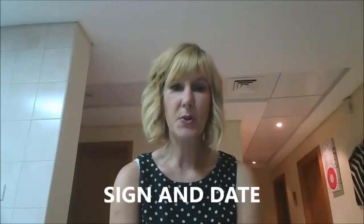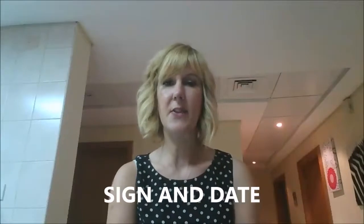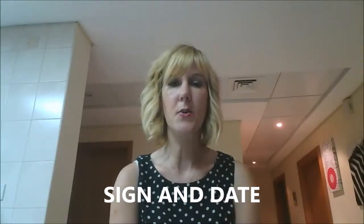And actually this is where a third party company is really beneficial, because they're familiar with the construction terms and they can get the message across to your builder very easily on what needs to be done to close out those items. So when you've finished your list, make sure that you sign it and put the date in. The date's very important so that all parties know that was the date you recorded the snags on, and once you move in, if they haven't been rectified, you will know that they were actually recorded before the handover.